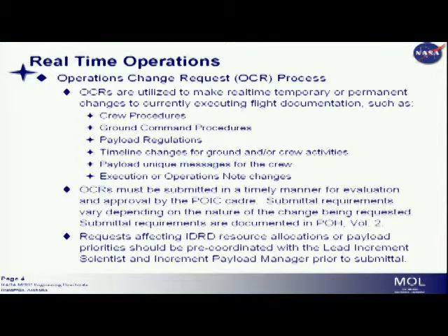If you have any changes to your scheduled crew activities, those types of things would come in on an operations change request for us to evaluate and then make the appropriate updates to that product and get that product on board for the crew to use, or available to the ground team if it's ground command procedures or regulations in those cases.